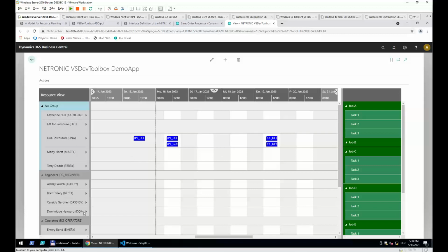One thing, and this could be done here as well, is that you create a new resource and name it unassigned resource, for example. Then all the allocations you already know can be put in this unassigned resource, and then you drag these bars from top to bottom into the other resources.